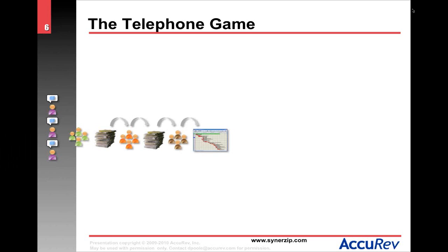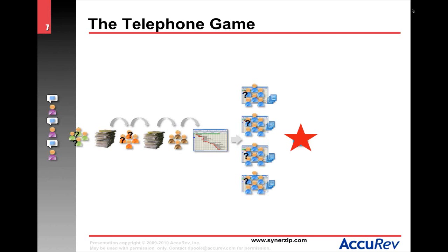managers and the managers or what have you who produce a giant Gantt chart, which then gets split up into multiple teams. They each have their project plan, which rolls up into the overall project plan. Then an integration. The problem here, though, is this tends to be very painful, right? We've done a whole lot of work. It's not integrated together yet. It's pretty far into the project. We're trying to get things to work for the first time.